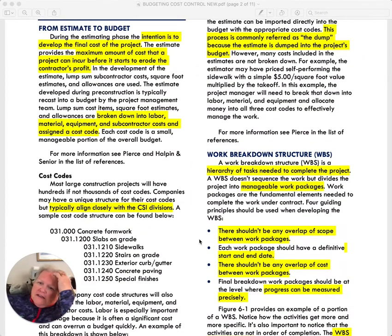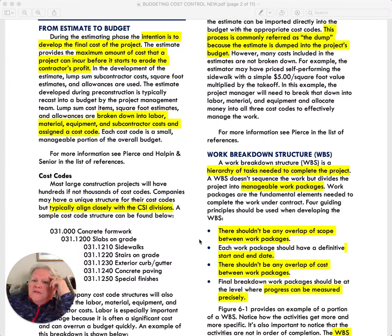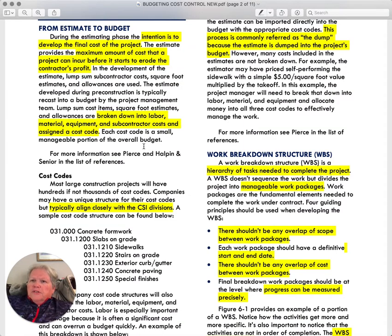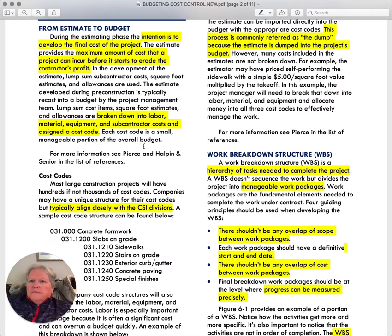One difference is that you will typically have major cost types within a budget that cover things like labor, material, equipment, and subcontractor costs, each assigned to a specific code. There are a few other designations you can break it down into, but these are the basic ones: labor, material, equipment, and subcontractor costs.